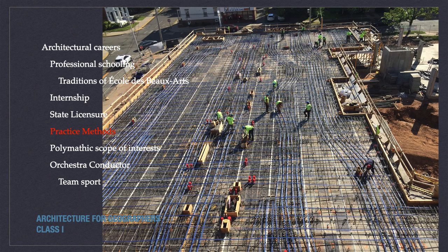In the last two phases, a great deal of the architect's efforts are spent on the financial aspects of the project. During bidding and negotiations assistance, the architect will help the owner find qualified builders to bid on the work and assists in evaluating their offers. It's often apples to oranges, and understanding the trade-offs can be complicated. And then finally assists with negotiating the terms of the construction contract and prepares the documents themselves.